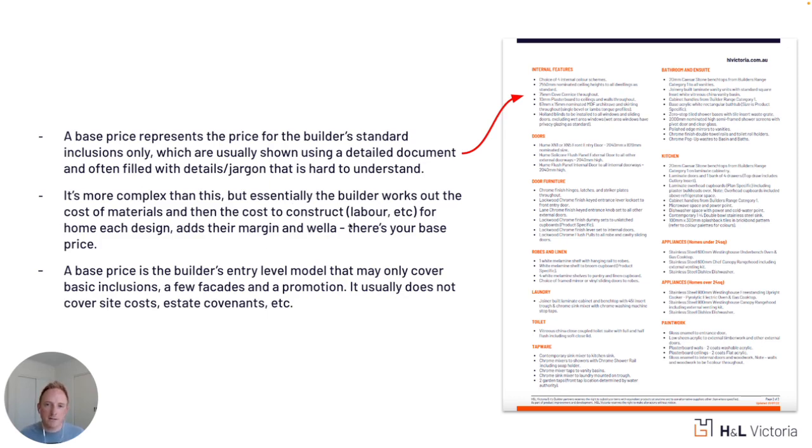They can't provide the site costs, as you've learned briefly in the previous couple of videos, because it depends on the land. So what they do is take the known quantities, which are the materials, the labour, the cost for drafting, etc., price that up and give you a base price. Most of the time, a base price is an entry level model that covers the basic inclusions, a few facades, and a promotion.